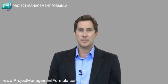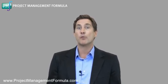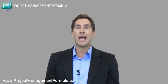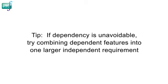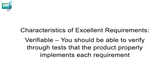For example, suppose a customer selects as high priority a requirement that is dependent on a low priority one. In this case, the low priority feature would have to be developed first before developing the high priority feature. When there is no way to avoid dependencies, you can combine the dependent features into one larger independent requirement, or find another way of splitting them. And the last characteristic of excellent requirements is that they are verifiable. Try devising a few tests or other verification procedures to figure out whether or not the product properly implements each requirement.